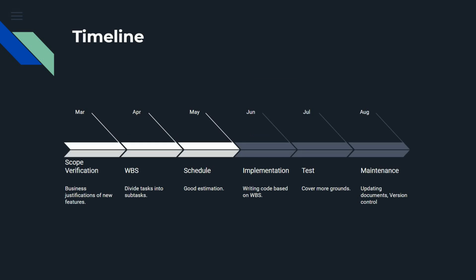So this is just a rough estimation of my timeline, but I will keep updating it as the project goes forward. I may just use the PERT analysis formula, where I would average out the optimistic, most likely, and pessimistic durations of each task.